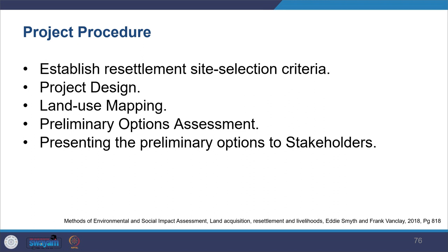And then you also need to undertake primary assessments. So what kind of options are available for primary assessments? When you're doing assessment for the resettlement site, you need to see whether the water is available or not, quality of water, quantity of water. You also need to look at the topography, the drainage, the soil quality, stability of the preferred site. All these should be undertaken, and you should also undertake suitability analysis for the resettlement site and then see how feasible it is for the construction of the resettlement housing and the infrastructure project, and what is the potential for future growth also. That all needs to be seen. And you have already seen how we undertake studies to look at the water, topography and all those aspects. So all that has to be covered in RAP.